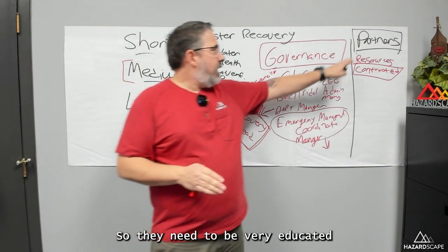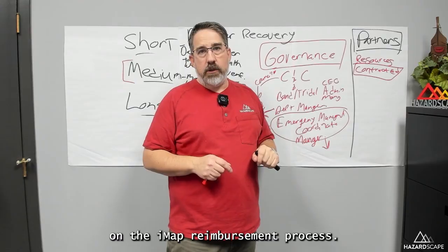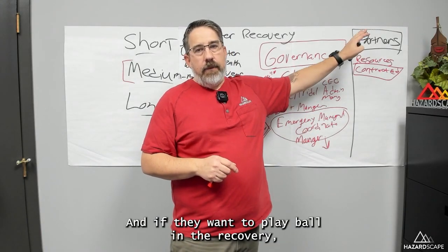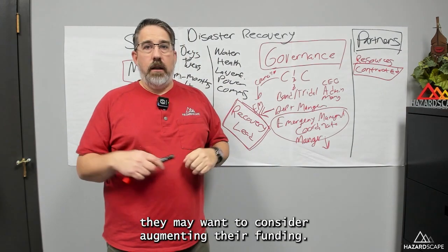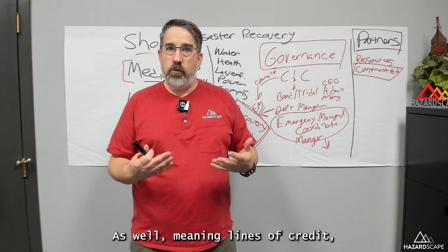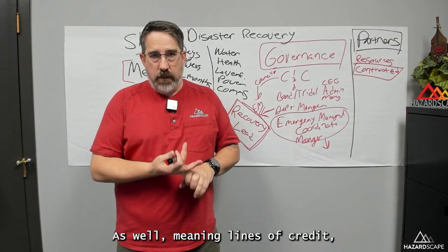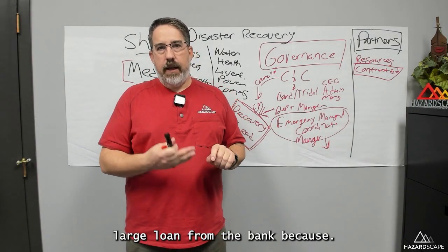So they need to be very educated on the EMAP reimbursement process. And if they want to play ball in the recovery, they may want to consider augmenting their funding cash flow as well, meaning lines of credit, large loan from the bank, because